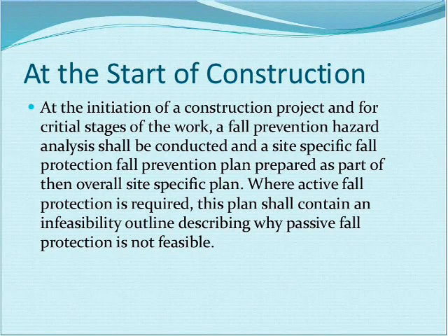At the initiation of a construction project, and for all critical stages of work, a fall prevention hazard analysis, which we've been talking about, shall be conducted, and then a site-specific fall protection, fall prevention plan prepared as part of the overall site-specific plan.